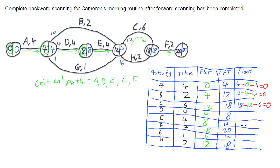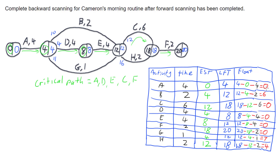Filling in the rest of the table, we can see the float times for all activities. B can start at the 4th minute, has to be finished by the 12th minute, and can be delayed by 6 minutes. A, C, D, E, and F cannot be delayed — they are all on the critical path. G can start as early as the 4th minute, has to finish by the 12th, and can be delayed by 7 minutes. H can start by the 12th, has to be finished by the 18th, and can be delayed up to 4 minutes.